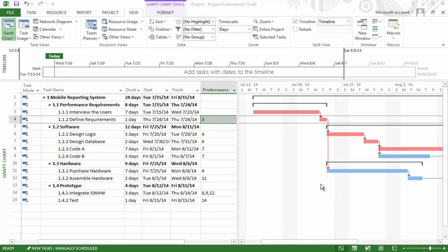If we look at our Gantt chart here, I have formatted it so that you can see the critical path in red. Since we only have one critical path, we could assume that this project is not that sensitive, but we also have to look at the slack for non-critical activities. If a non-critical activity has relatively little slack, a delay in that activity could cause it to become critical, therefore